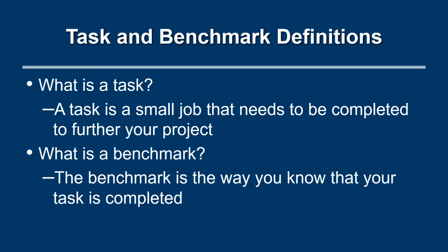Now let's look at tasks and benchmarks. A task is a small job that needs to be completed to further your project. The benchmark is the way that you know your task is completed. For example, if one of your project goals is to develop a training, your timeline would include when you will develop the materials and when you will do the trainings.